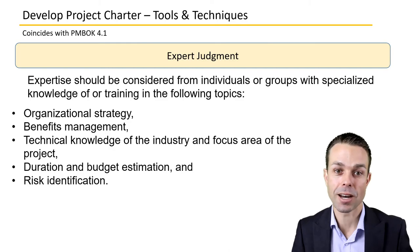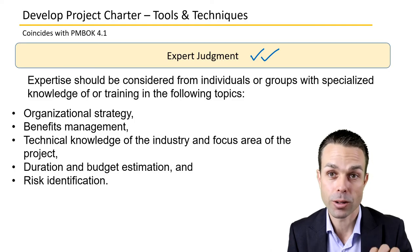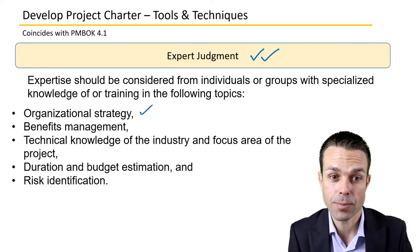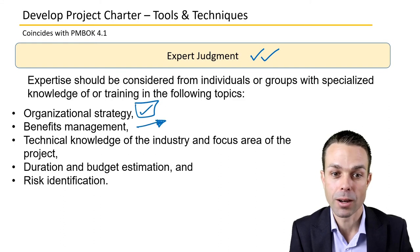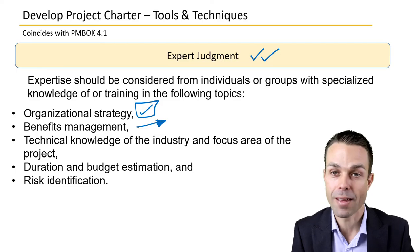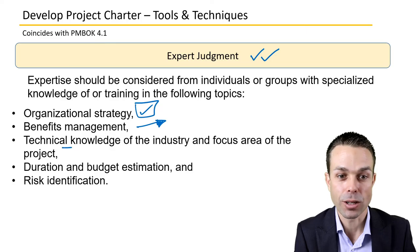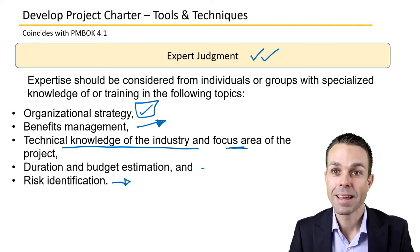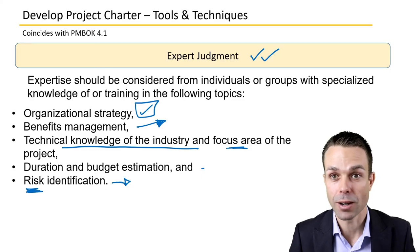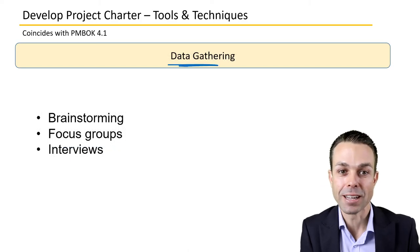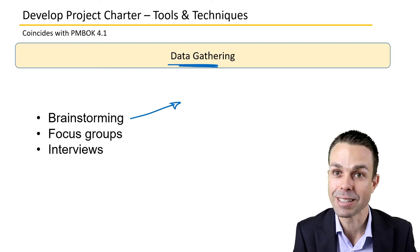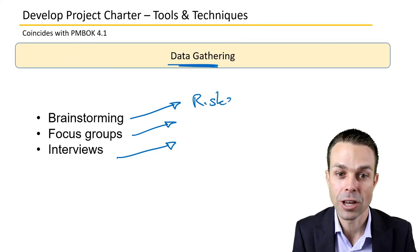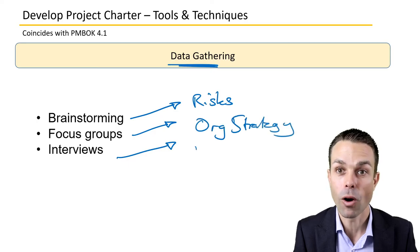Tools and techniques for the project charter include expert judgment — you'll need the people in the area where you're making the change and their expertise. This might involve the organizational strategy you need to tie the project charter to, benefits management, technical knowledge of the industry, duration and budget estimation, and risk identification. Data gathering is also part of the tools and techniques — that might involve brainstorming, focus groups, or interviews to gather information on risks, organizational strategy, and benefits.